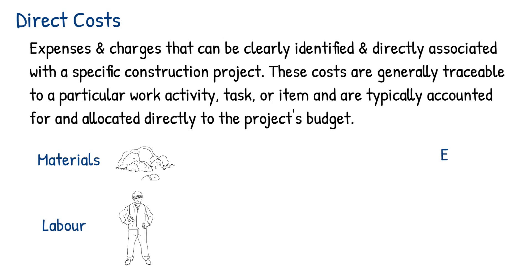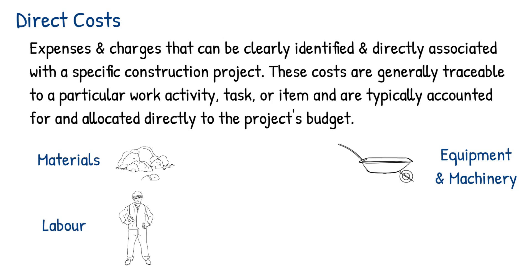Equipment and machinery: costs associated with renting or purchasing specialised tools, machinery and equipment used exclusively for the project. This can include things such as excavators or cranes.